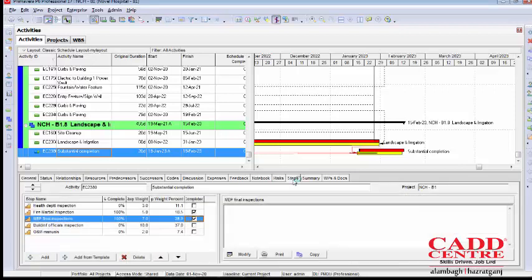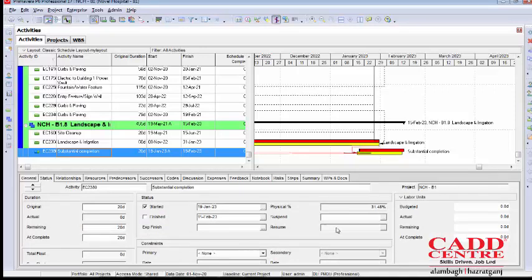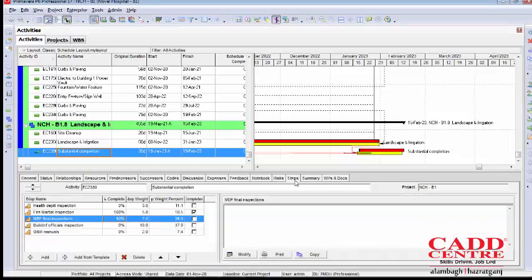We also have an option in case we feel that MEP inspection is not 100% over. We can simply unmark the completion and specify % completion for this step. So I can see now the progress has been updated as 31.48%. However, to avoid complexity, it is always recommended to wait until the task step is 100% complete, and then we can simply mark it as completed so that we can check the status.